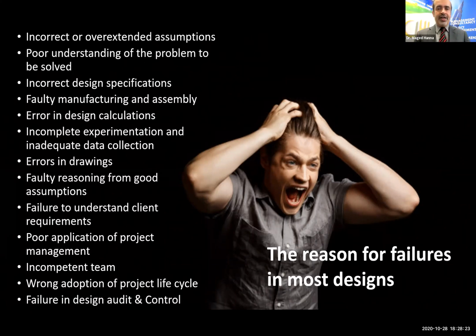Failure in the design, audit, and control. The design phase, like any phase in the construction of the product, needs audit and control. A lot of the time, if you adopt a control process over the design and you audit it, you will eliminate a lot of the errors and reduce the risks that can be triggered over the project. These are just common factors that cause designs to fail.